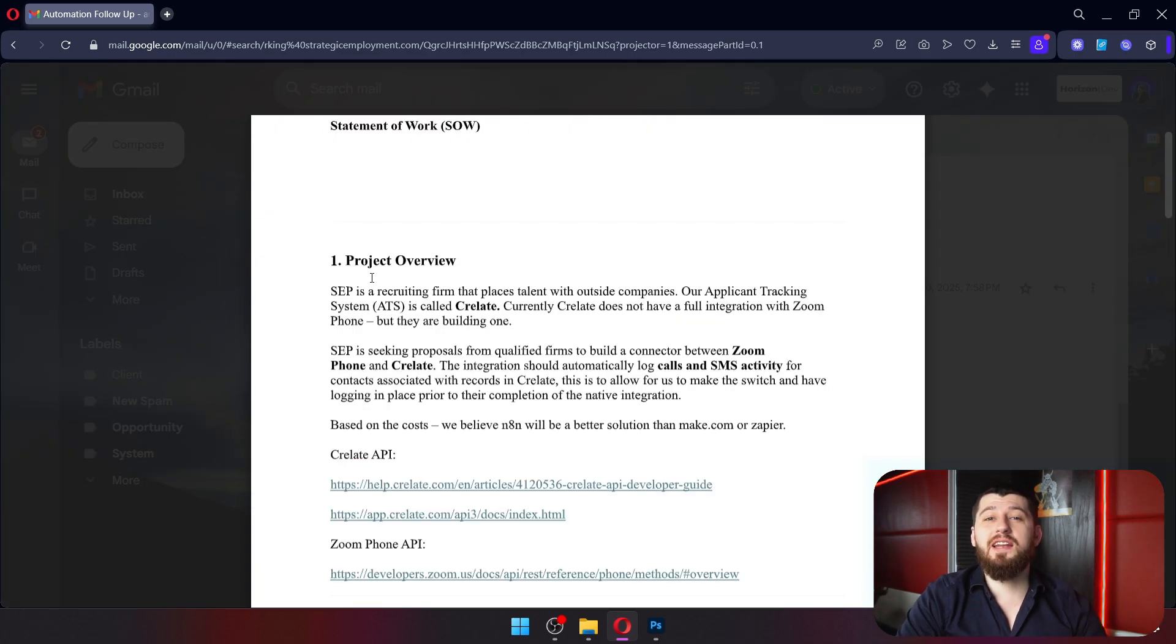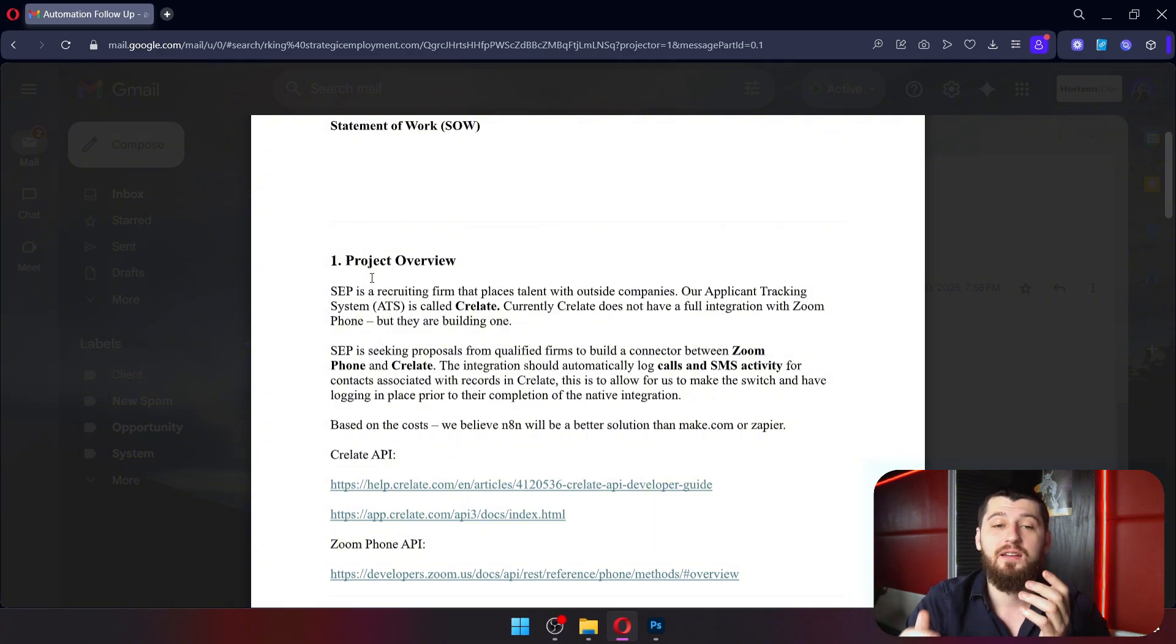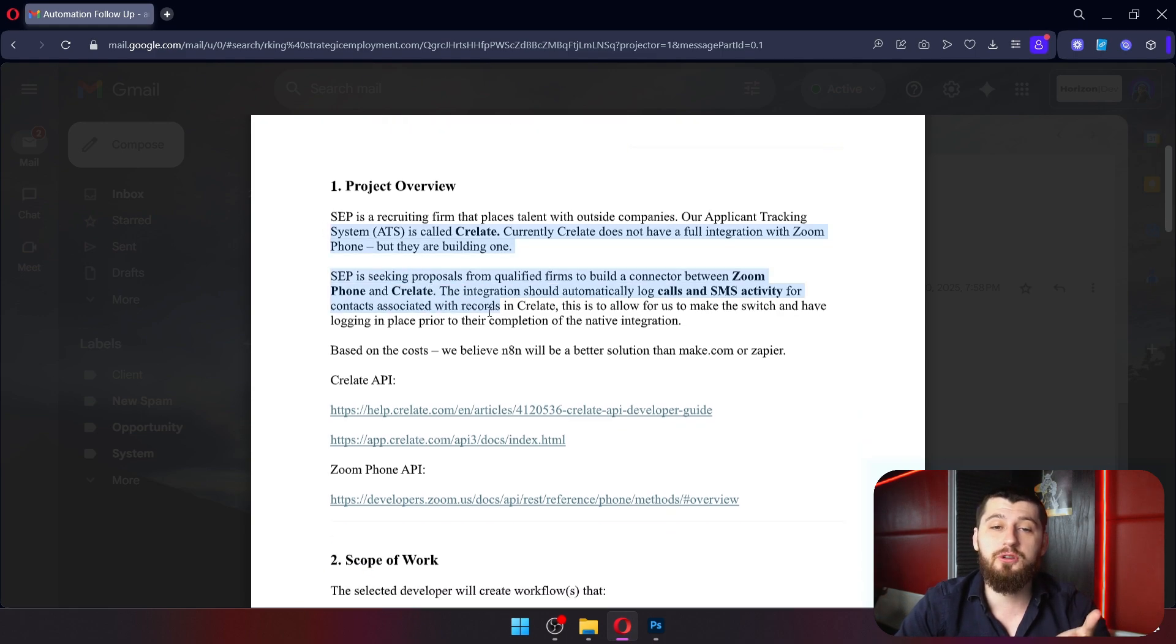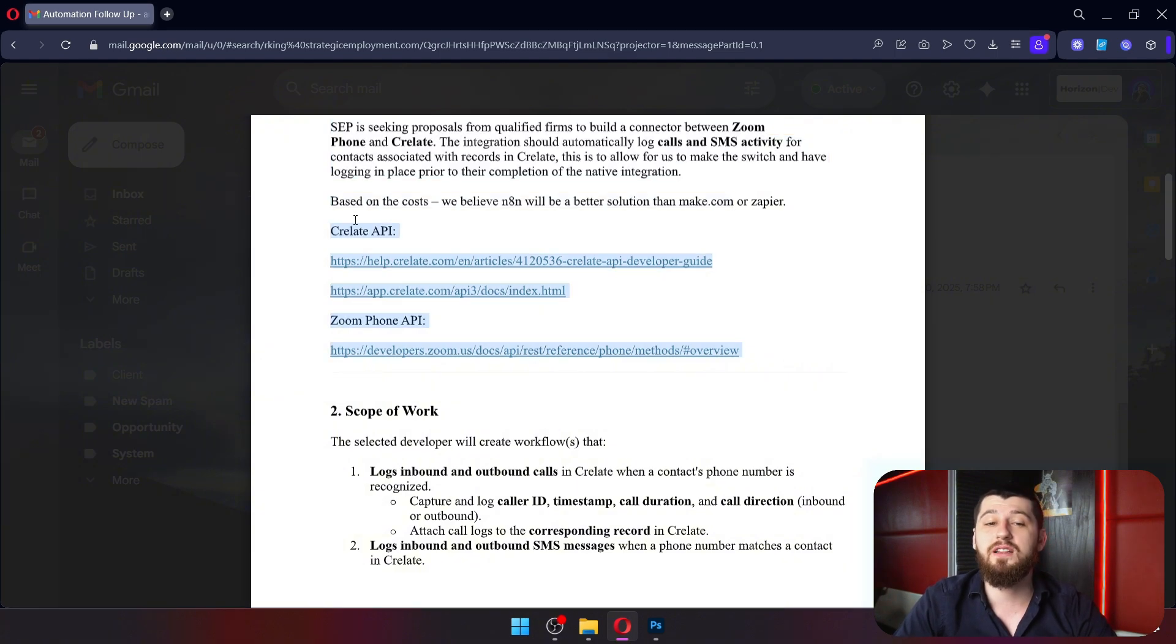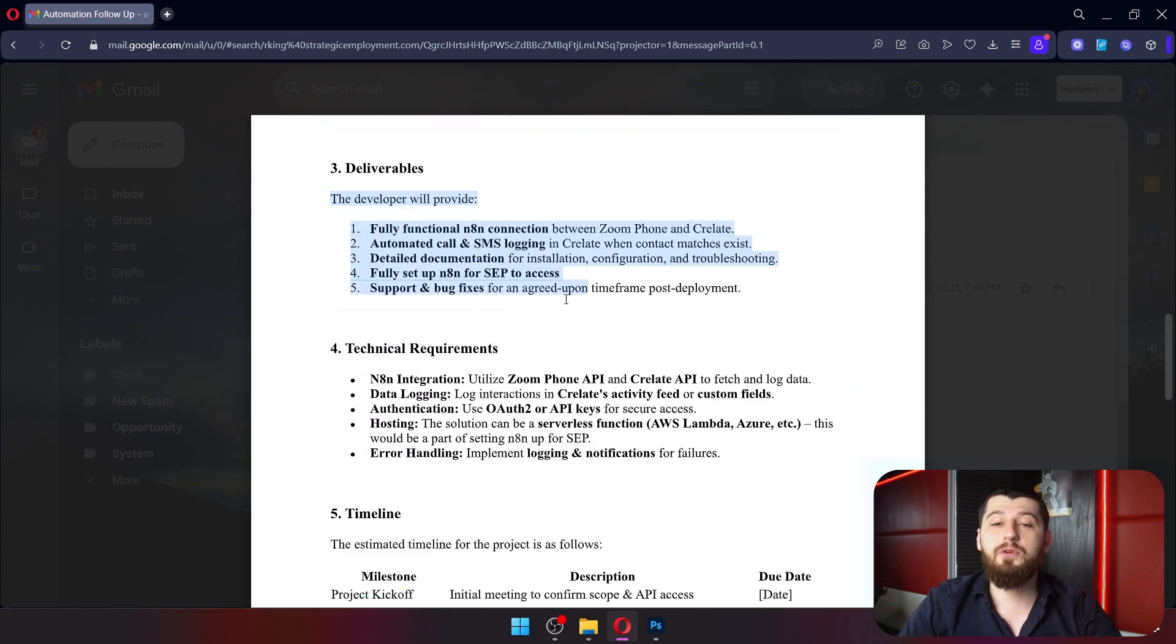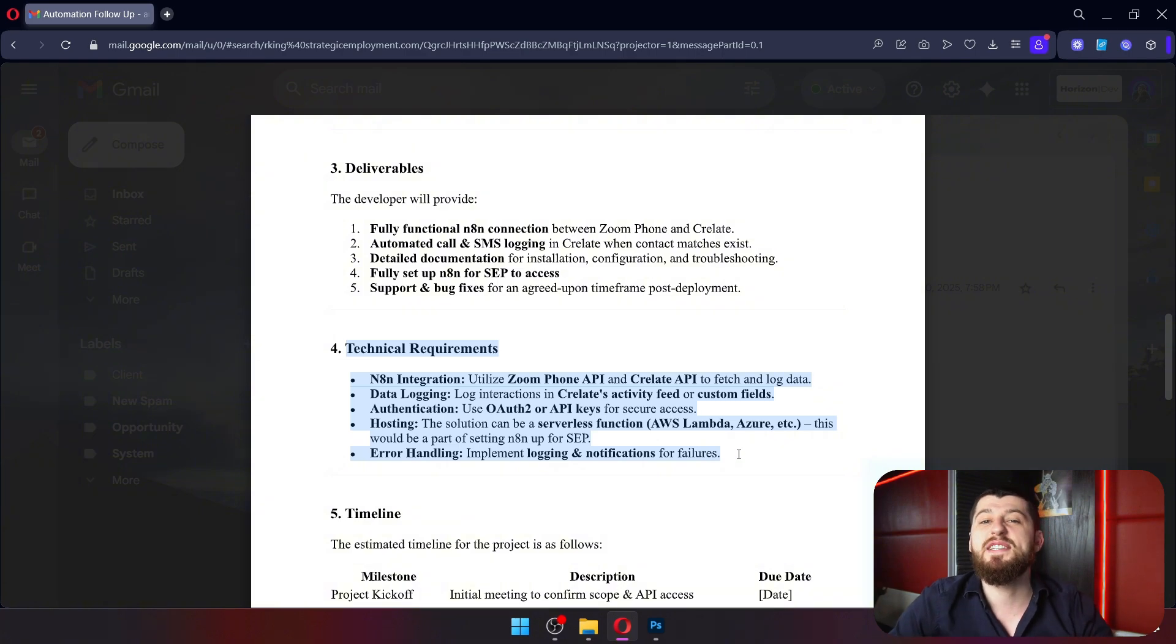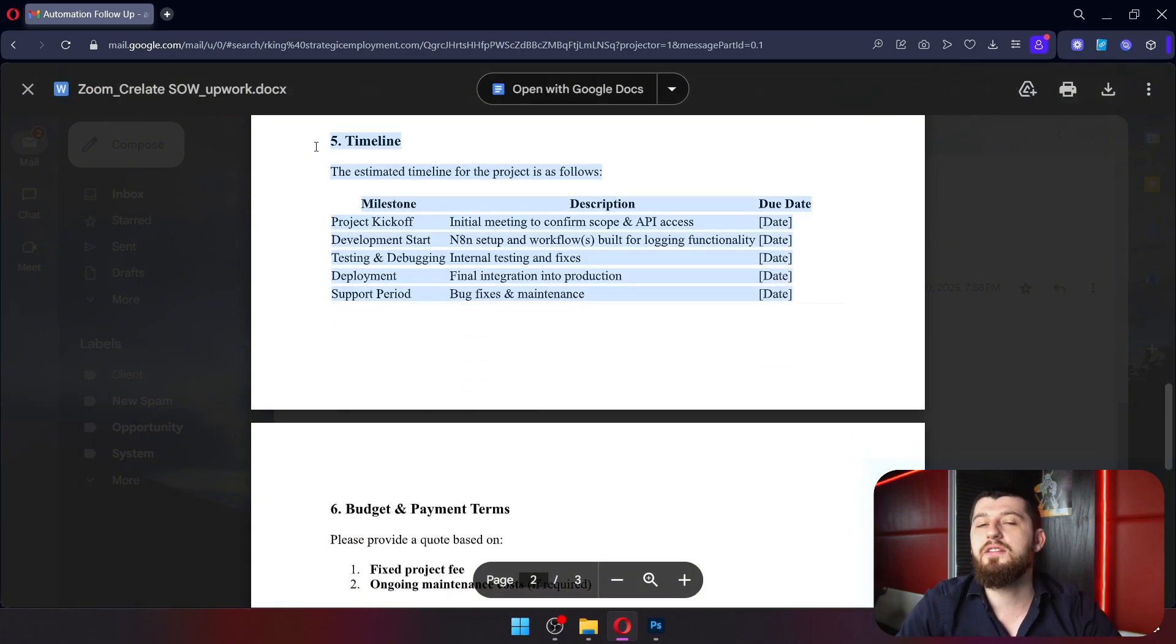The client provided a scope of work document in this example and it's always good to have one. So this is kind of what it looks like. First you have your project overview which talks generally about what you're trying to accomplish, maybe has some supporting links. Then you talk about the different workflows that you need and the functionalities. Then we've got the deliverables and the technical requirements, so basically what tech stack are you using.